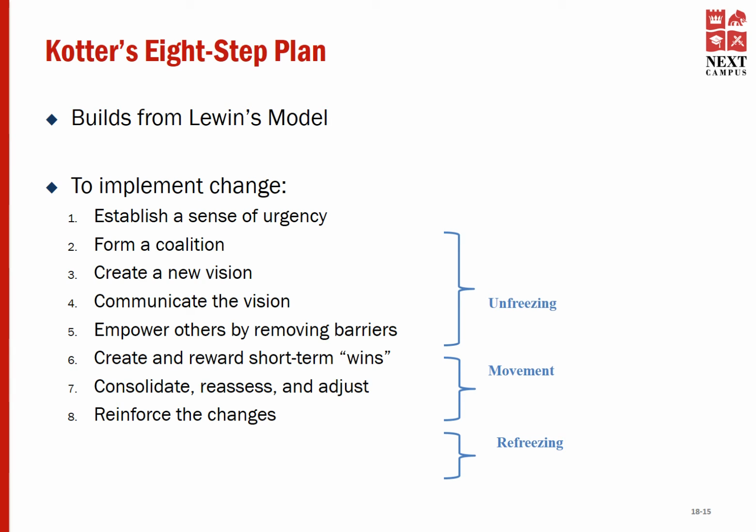Step number 1, establish a sense of urgency. According to Kotter, it's important that you establish an urgency within your teams. The people need to understand why these changes are being implemented, how urgent these changes are.